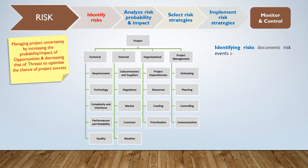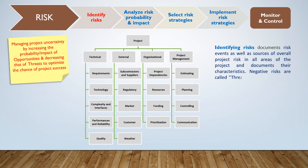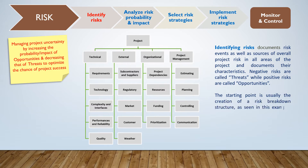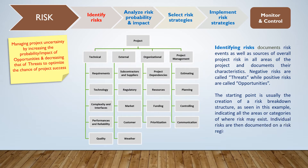Identifying risks documents risk events as well as sources of overall project risk in all areas of the project, and documents their characteristics. Negative risks are called threats, while positive risks are called opportunities. The starting point is usually the creation of a risk breakdown structure, as seen in this example, indicating all the areas or categories of where risk may exist. Individual risks are then documented on a risk register.